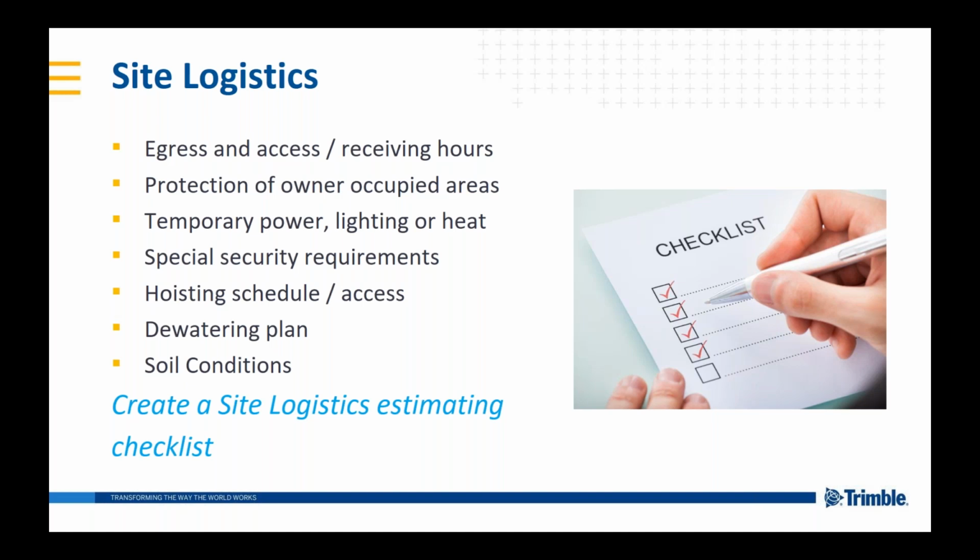Soil conditions, obviously, when you have underground work to do, need to know what the soil conditions are, type A, B, or C soil, or stable rock. Those are all things that you need to know in that pre-bid walkthrough.